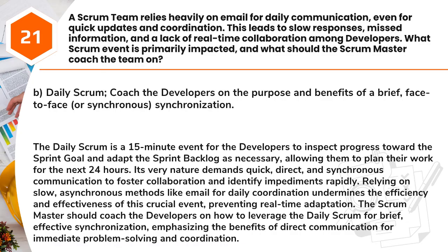Relying on slow, asynchronous methods like email for daily coordination undermines the efficiency and effectiveness of this crucial event, preventing real-time adaptation. The Scrum Master should coach the developers on how to leverage the Daily Scrum for brief, effective synchronization, emphasizing the benefits of direct communication for immediate problem-solving and coordination.